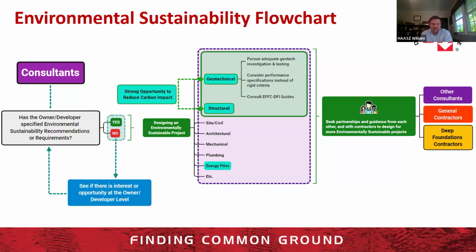So whenever you're in the beginning stages, if you're going to have foundations, it's in everybody's best interest to have the right data, and as much data as you need, to plan and design appropriately. Again, considering performance specifications instead of rigid criteria, and then also consulting the EFFC and DFI guides that we mentioned. And then over here, just the catch-all, right?